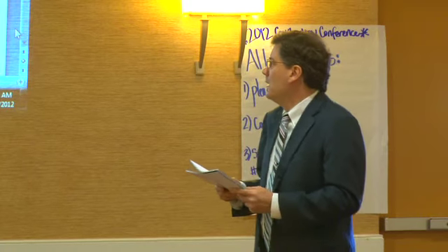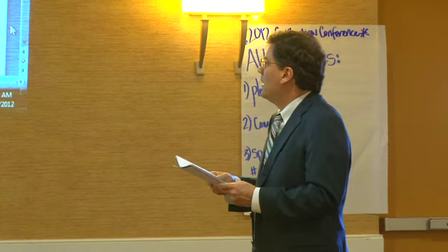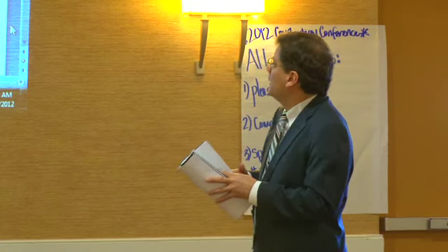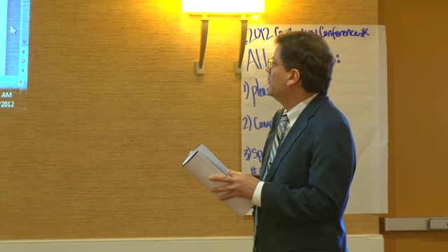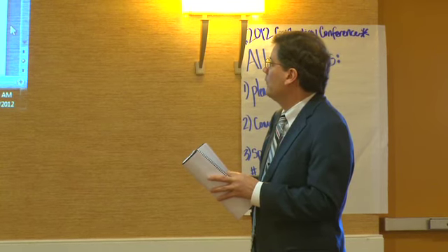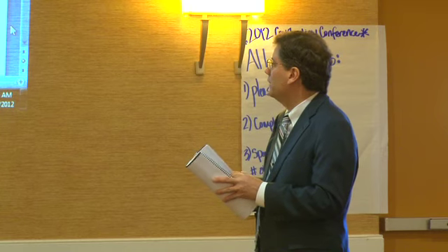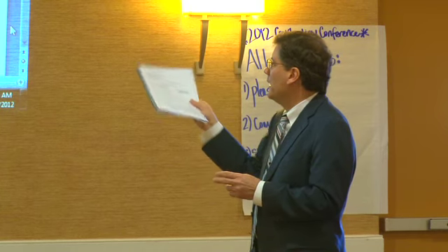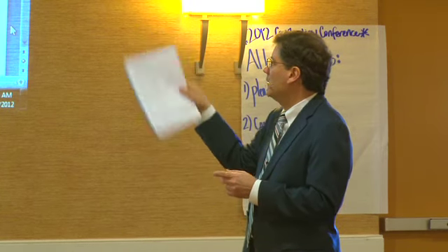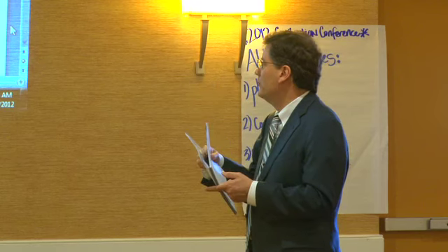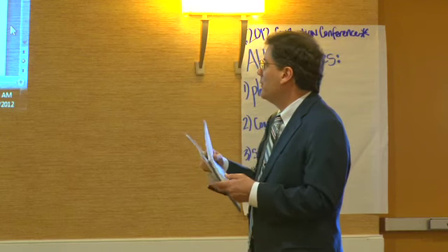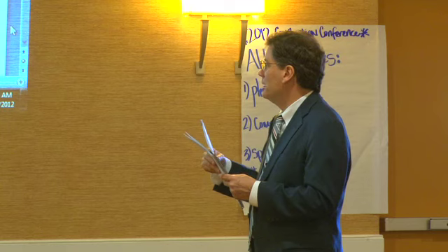Number 9 is, to your knowledge, the building has not been completed. Preliminary notice was served on such and such a date. And we've indicated that you've got to supply the affidavit of mailing, the proof of mailing, and a copy of the 20-day notice as an exhibit. In Arizona, you got to have a lot of exhibits to your lien claim.